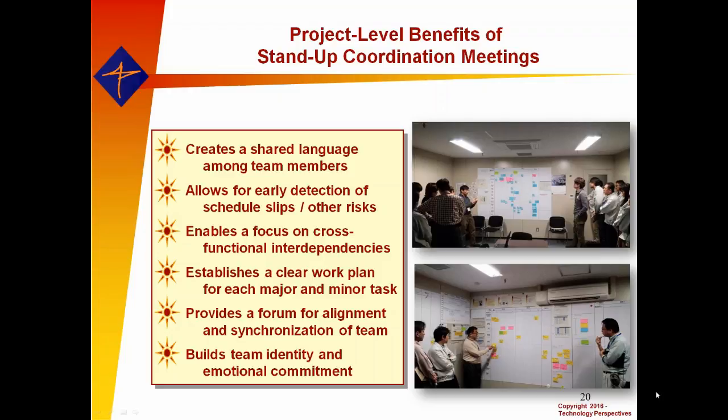And I want to emphasize the stand-up meeting and project board are owned by the team. This is not a team leader tool to help make their job easier, though it will, absolutely. It is intended to be team-owned. So the stand-up meeting is not everyone talking to the team leader. The stand-up meeting is everyone talking to each other. And the project board is owned by the team. It's updated by them. You'll see in a little bit, each person has their own swim lane. They own that swim lane. So now we've got the empowerment and accountability piece taken into account.